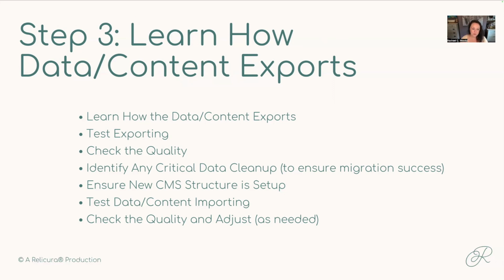So testing export is incredibly important. In fact, I recommend doing it while you're shopping, just because that can have such an impact on the implementation piece. I recommend checking the quality of the type of data that you're getting out of your system, because sometimes the way we see it in the system is different than how it comes out and is not necessarily usable.